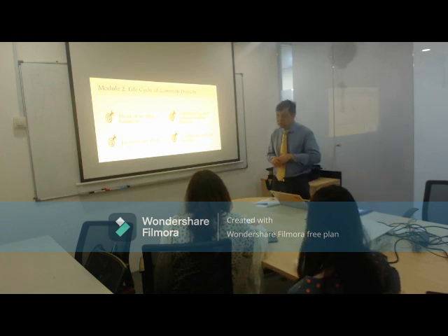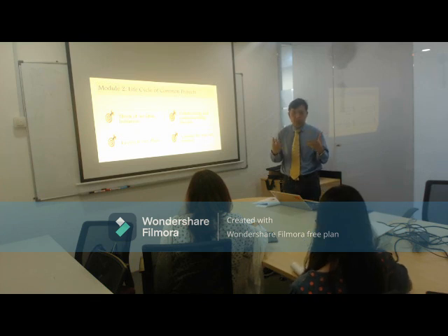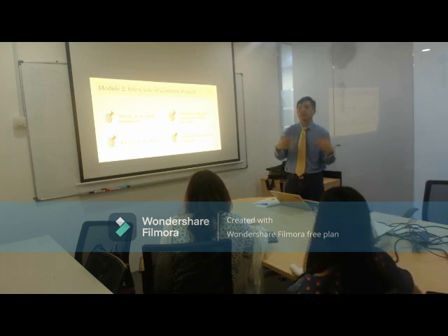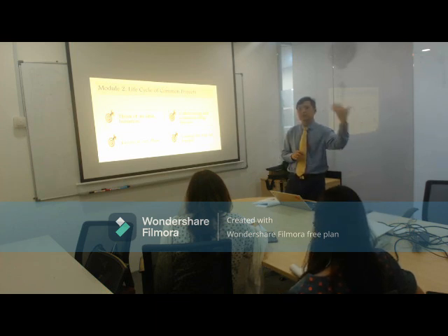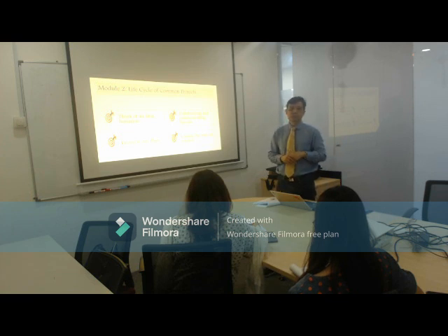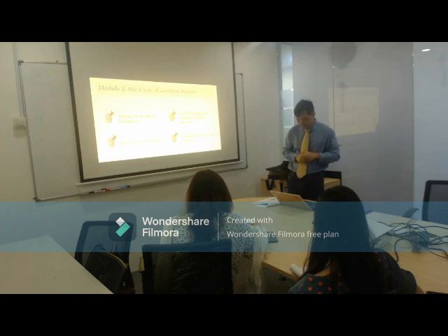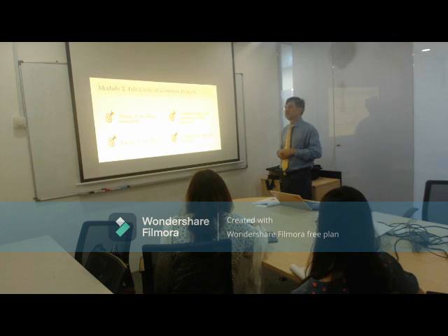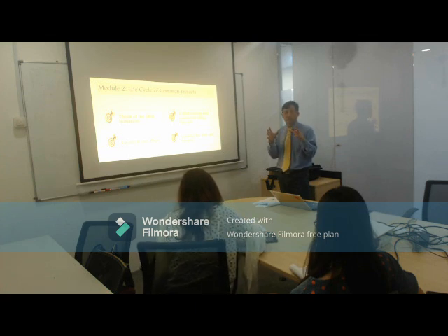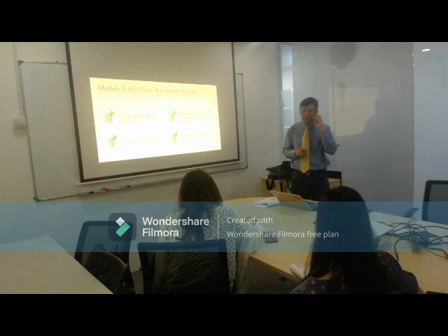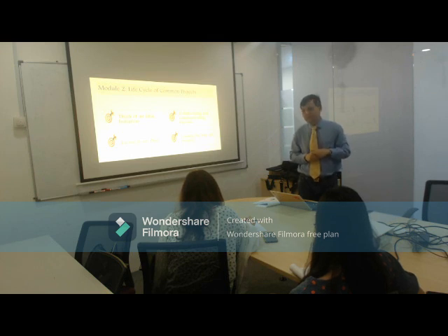There was also a risk. Because it's COVID season, or COVID is being reported prevalently, the painter could contract COVID and test positive. Are we willing to take the risk? If he is, then what is going to happen? Another thing is, for example, we run out of paint while doing the paintwork. Can we get the same tone of paint again for our room? Those are things that we look at. So that gave us an overview and idea of project management.